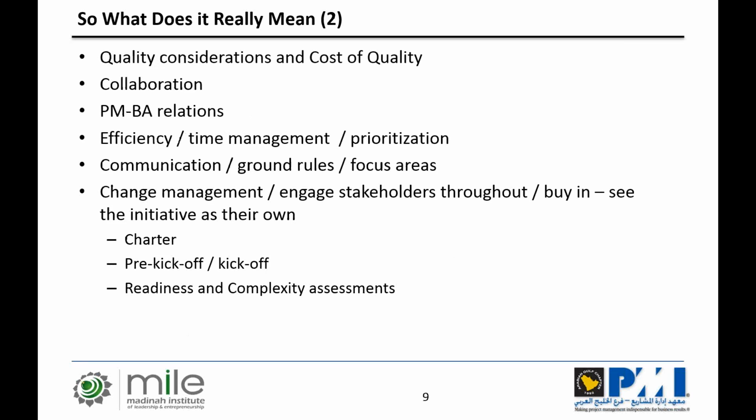Quality. Understand what quality means and then measure how much it costs us to achieve it. Quality costs money, we know that. I mean, philosophically it doesn't, because whatever we put into it will be paid off later, but it does cost money, and we must be able to understand how much we are spending on it. Surprisingly, many organizations spend too much money on quality. They just don't spend it in the right places. They spend it in too much red tape and inspections and approvals rather than actually proactively upfront on prevention activity.